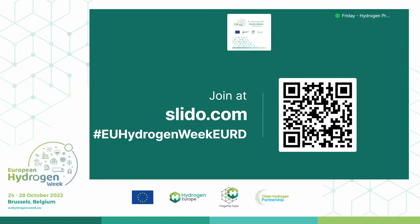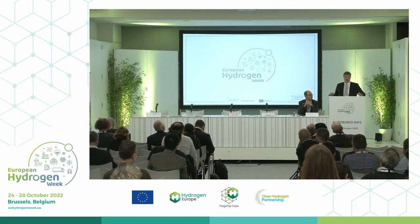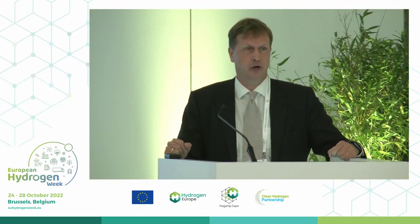Contrary to the previous presentation, you haven't mentioned any problems with balance of plant. Can you elaborate? Sure. We had problems, for example, with the analyzer system. Analyzing oxygen and hydrogen is obviously not state of the art. The systems are not very stable. We had some issues there. Another part was a design error from the cooling section, but this was just an error. We had to increase the area of heat exchanging.